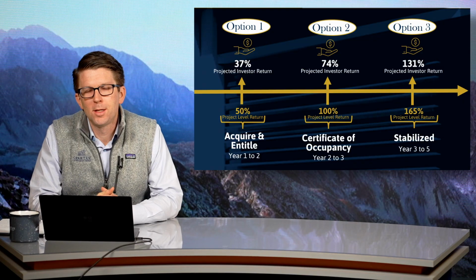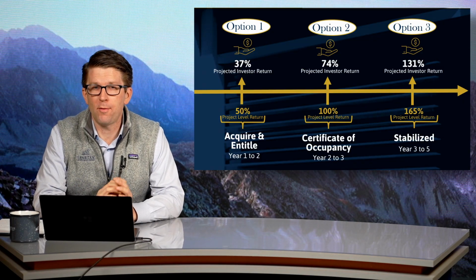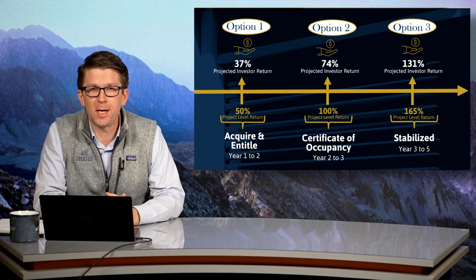So when we initiate a contract, we begin that government approval period, start engaging with the seller, engaging with the city, and doing whatever needs done to entitle this site for a ground up self-storage development, at which point we can end that government approval period and finalize the closing on the dirt. So basically what you're saying, Gerrit, is we don't have to close on this property until we have a full set of drawings completed, bulldozers on site, ready to start pushing dirt. You're exactly right. We have no obligation to purchase this until we are ready, and we have totally de-risked the project. We began working with the seller in October. We put this site under contract in January, but we likely won't close on it until June, when we've got a full set of building permits, drawings in hand, and bulldozers on the way.